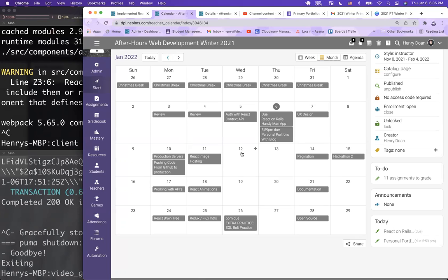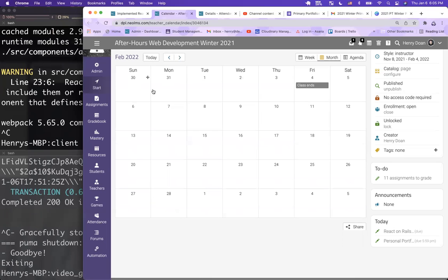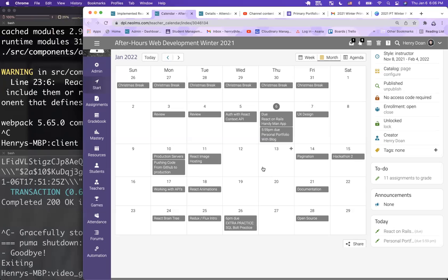There are going to be specific goals of what we are going to be doing, such as for this first weekend and on Wednesday, we'll try to get the initial project started as well as the initial database schema planned out and authentication. And then the next few weeks is just going to be busting out the CRUD actions and all of the features. Afterwards, this final week is to do the finishing touches with styles and then put it live in the production server. And then that is when you are going to round up those features.